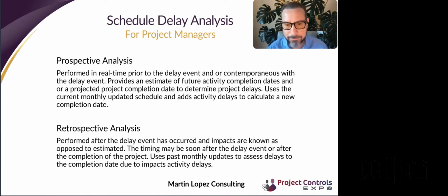Retrospective analysis is done when the delay has already occurred and the number of days of delay are known. Sometimes when there is no agreement as far as what a delay is or should be, then the delay continues, the delay event is completed, and then the dispute arises, and in this case, a retrospective analysis is performed.